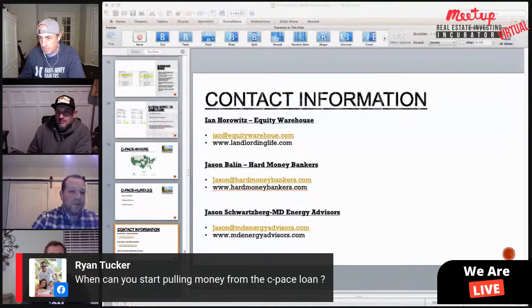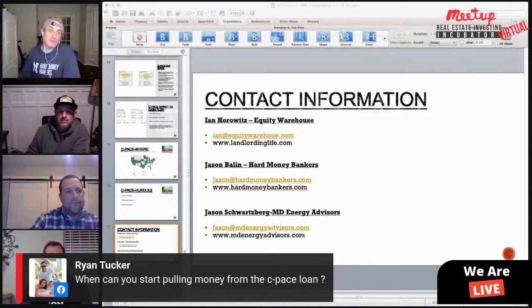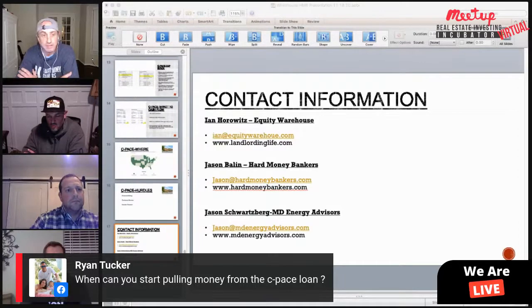If it's a new construction deal, again, we're not helpful towards acquisition because there are no energy related improvements. We're not helpful towards site work because there are no energy related improvements. But as soon as you start to incur energy related expenses, either on the design side or ordering equipment, you can start to draw down on the C-PACE loan. So just like a regular construction loan, the sponsor, the owner, investor does the work first, right? And then you guys have to sign off on it, knowing that it's sufficient, and then you send them the money to reimburse them.